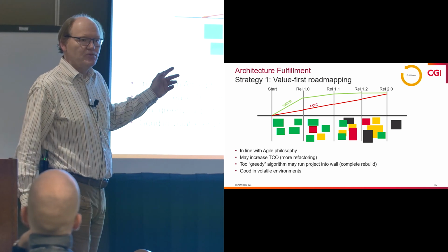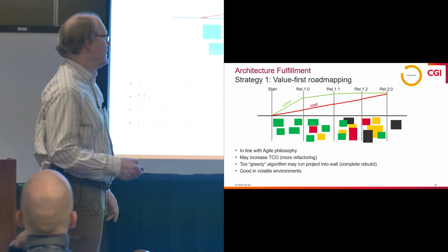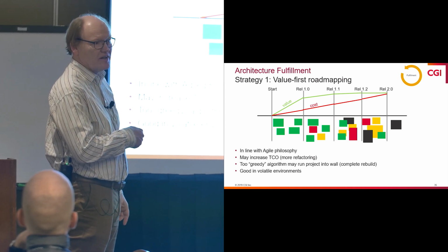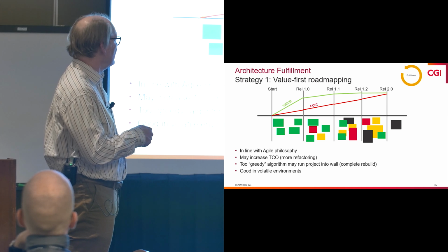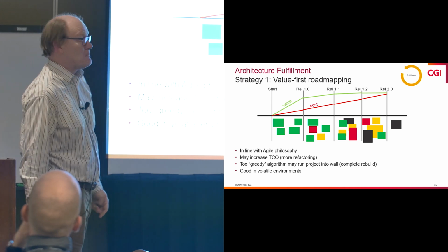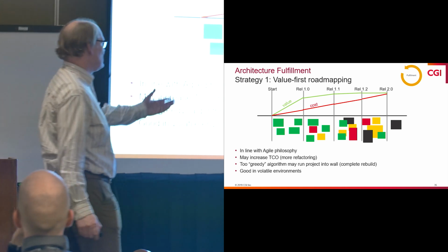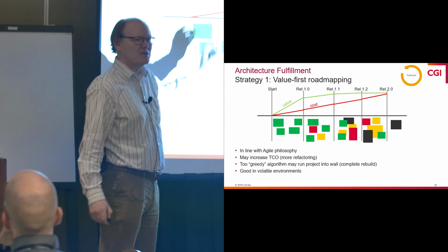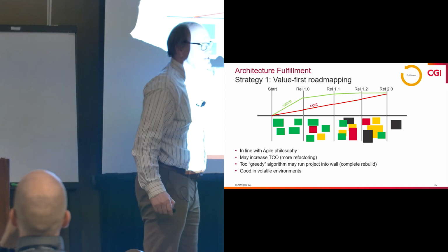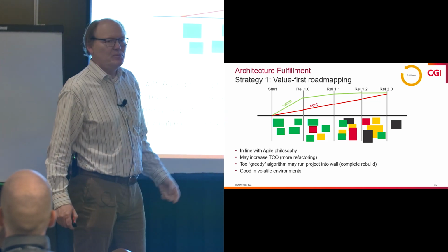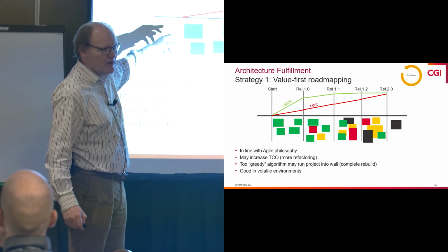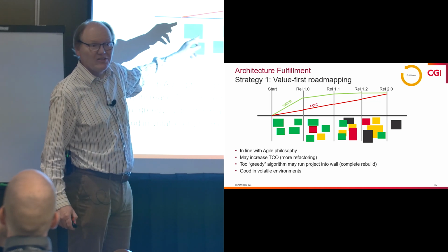One risk, of course, with this approach is that stakeholders experiencing this line, if you don't do expectation management correctly, they will think that this will go like this, right? And who can blame them? Because they see the team starting off and it's, oh, we have such a wonderful team, they have such great velocity. Of course, we already know that this is going to happen. So we must tell them here, listen, dear stakeholders, we are going to show you something terrific, but it's not going to last.